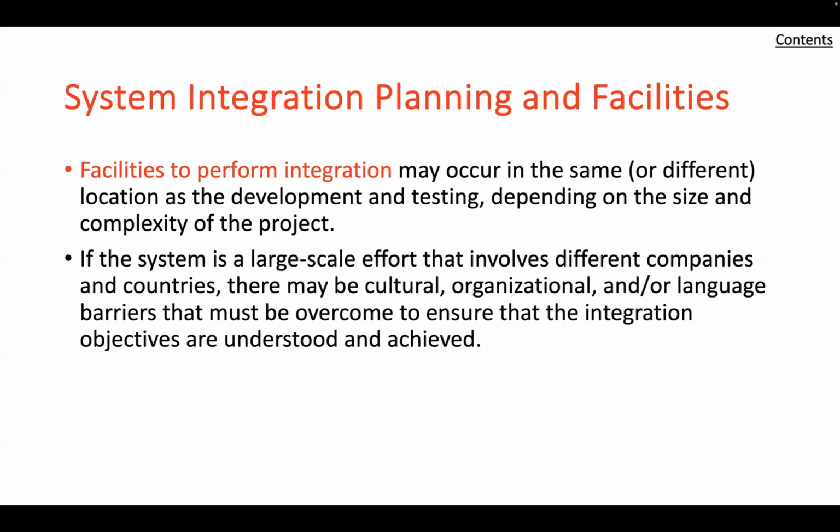The price for this stepwise integration of the system is that at every step, the test equipment must simulate the relevant functions of the missing parts of the system. Nevertheless, experience in the development of large systems has repeatedly demonstrated that the provision of this capability is, in the long run, quite cost effective. In the integration of large software programs, this is frequently done by connecting the program executive to non-functioning modules, which are successively replaced one at a time by functioning modules.